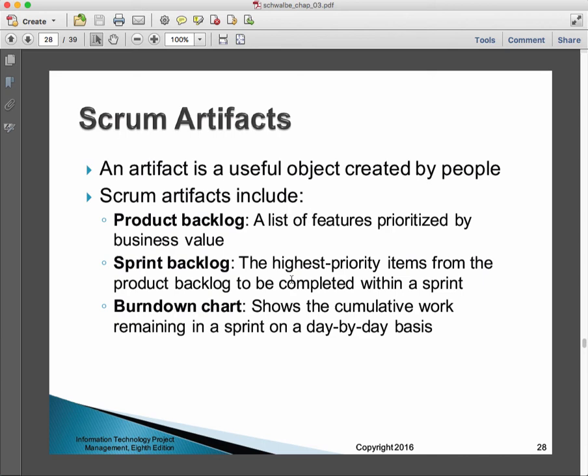Now, I have to point out that it's just not by priority, okay? When we look at all the features that get on the backlog, some of them naturally go together. There's an efficiency in working with them together. So we want to pick things from the top of the high priority list, and then we want to have things that go with them in an efficient way, accompany them, even if they're not high priority in their own right. They may enable higher priority things.